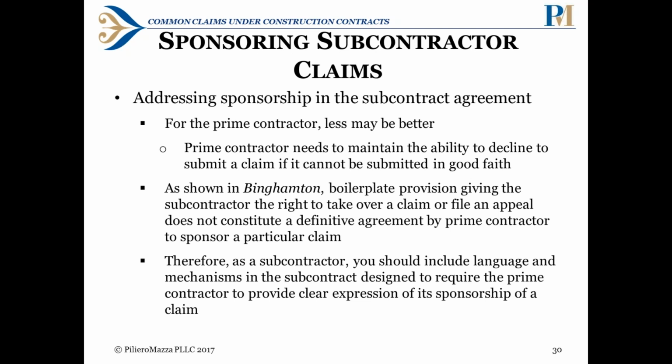So we recommend that you address the sponsorship in any subcontract agreements. If you're the prime contractor, then less may be better. The prime contractor needs to maintain the ability to decline to submit a claim if it cannot be submitted in good faith. So as the prime contractor, you don't want to agree that you'll submit any claim that the subcontractor has. You don't want to be bound to what they come up with. So you would want to try and limit that in the subcontract agreement.